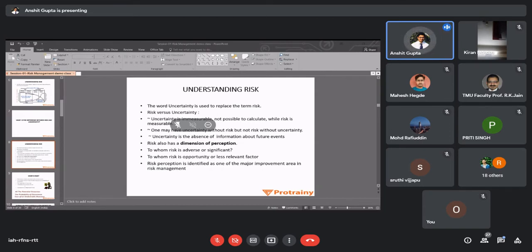You prepare a risk impact score table, you calculate the probability of that event, and then you calculate the impact of that event, and you multiply the same, and then you are able to come up with a risk score. That is how we calculate risk in real life.